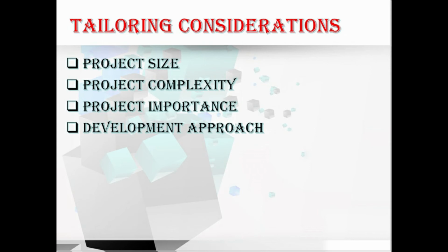Coming to the project importance. Here we need to consider how strategically important the project is. Coming to the development approach. Here we need to consider, is this a waterfall project where the risk processes can be followed sequentially and iteratively, or does the project follow an agile approach where the risk is addressed at the start of each iteration as well as during its execution? So all these need to be considered when choosing the development approach.